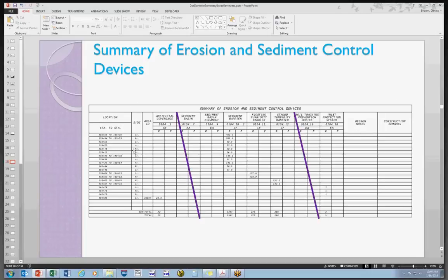This example, and I'm just going to tell you flat out, came from the BOE. I mean, not the BOE, it came from the PPM. If this was what the project was, and these were the quantities that I have, these 2 columns that I've got a line through should have been deleted or hidden. They are not being used on the project. They should not be showing in the summary box.